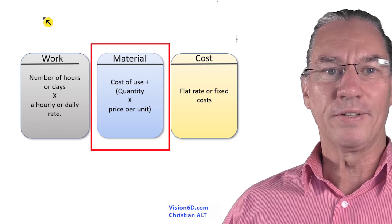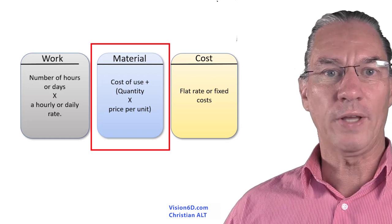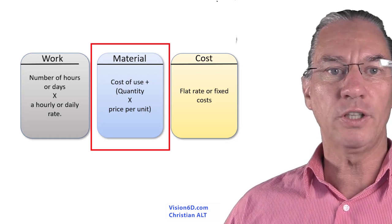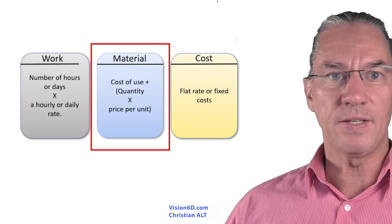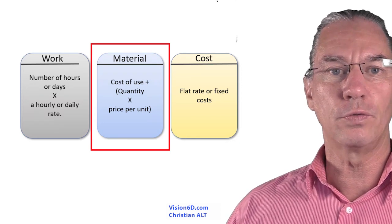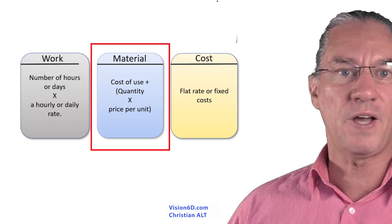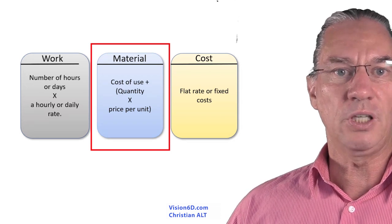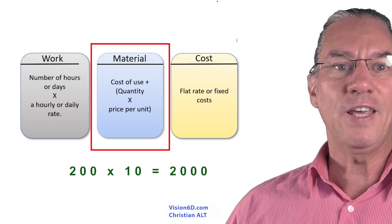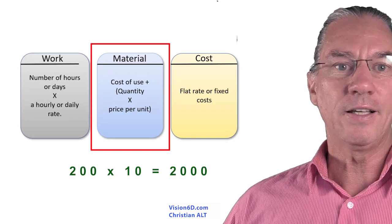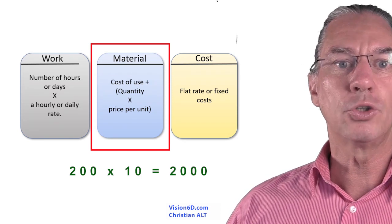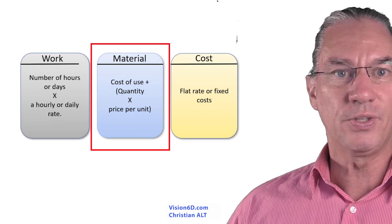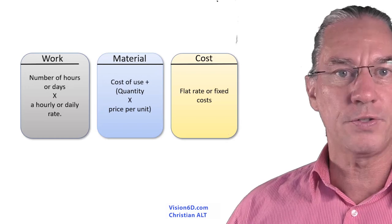The second one is called material. There is a question of quantity and the quantity is multiplied by a unit price. In some cases of building a house you might need a certain volume of concrete delivered on site. For example, you could use 10 cubic meters of concrete. If each cubic meter is 200 euros, it would make 2000 euros for the 10 cubic meters. So this is a material resource and its cost.